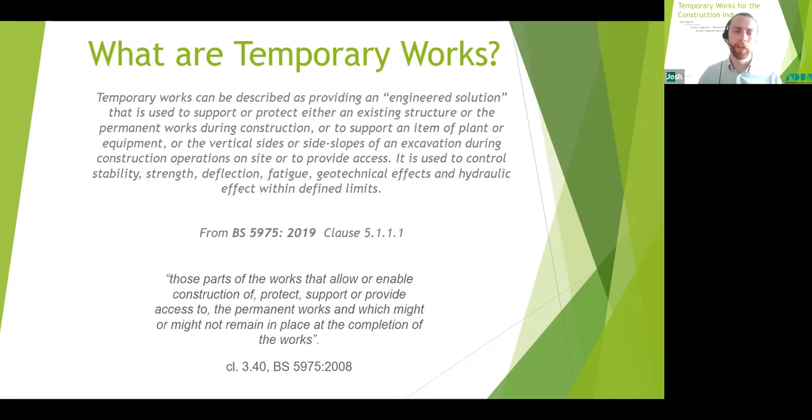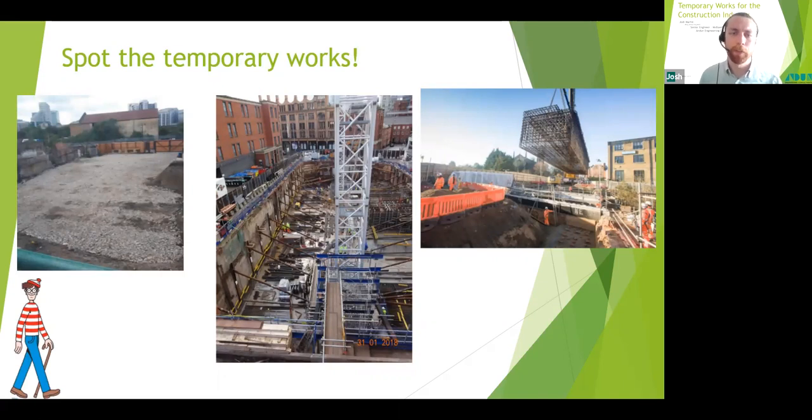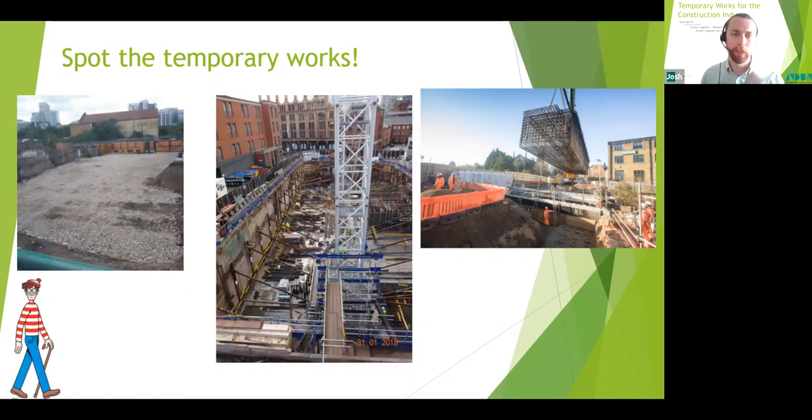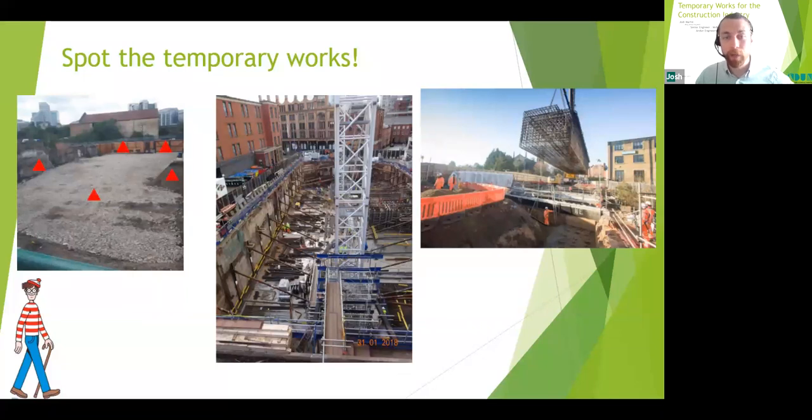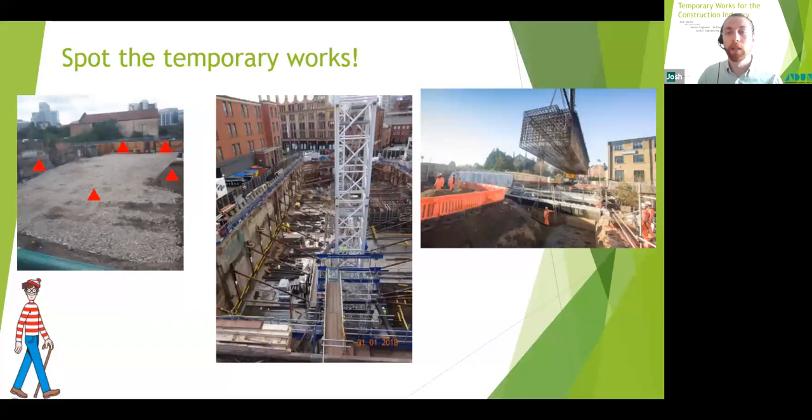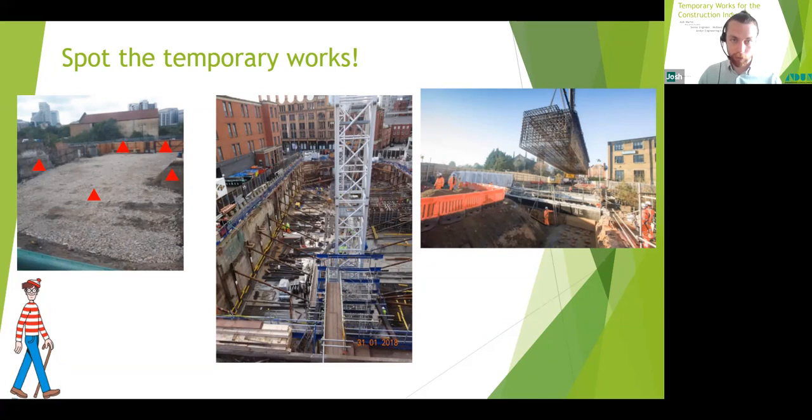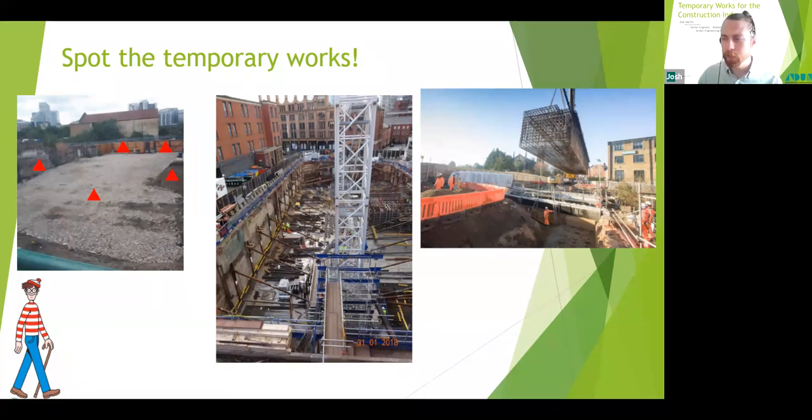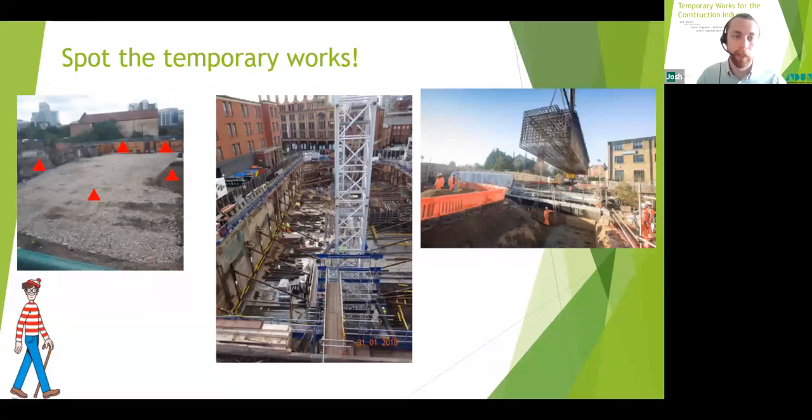So let's have a look at what that means in reality. We have our friend Wally down here who's going to help us spot some temporary works over these next few photos. First, we have quite a simple site. We've got some hoarding, gates, piling platforms or working platforms, temporary stockpiles, which is probably overkill in this situation, but for larger stockpiles the temporary stability is often a consideration. And also an assessment of the existing structures in the temporary condition, which is over in the corner on the left-hand side. If it's changing from its current state to a temporary state to a permanent state, that needs to be considered.